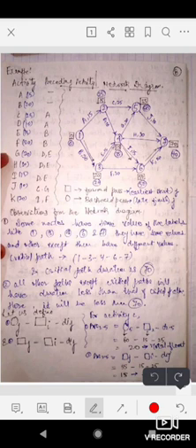We can see by how much time we can delay that. For example, I will tell you by one example. See, for activity A we can finish it from 0 to 15, but we can delay it by 25 days, because we have some slack here, some extra time here, so that we can delay it till 25, and we need at least 15 days to finish activity A. And if we are delaying it, then the maximum we can delay is about 25 days.